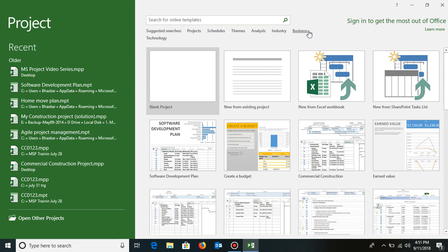Hello, in this topic we are going to learn how to create a project calendar. Setting up a correct project calendar is very important because in this you will set up your working days, your working timings, all those planned leaves that your organization has, so that you can schedule your project only on the working days, and you come out with a duration, end date and start date which is realistic and as per the working days.